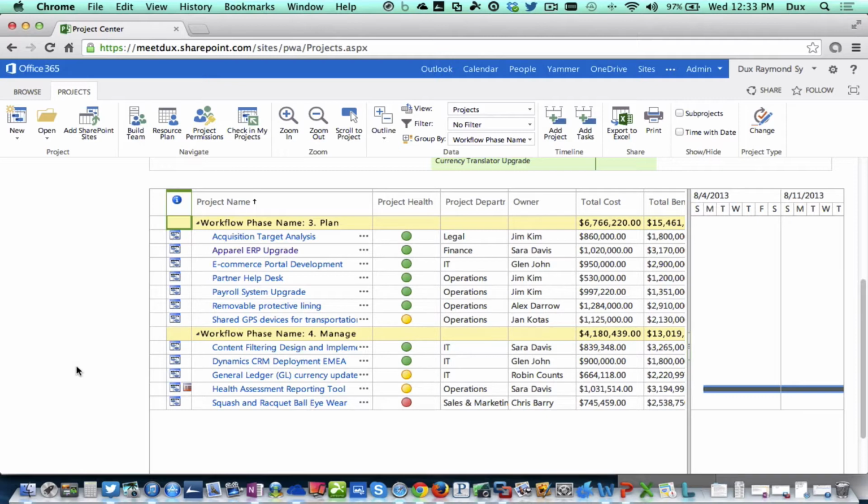And I put a KPI column called Project Health. Now, what do these mean? It depends on your organization. Green may be: as long as it's on budget, on schedule, we're green, right? If it's 10% or let's say 30% behind, then that's a yellow. So you can put all these definitions in there. Total cost, what's been spent, all that good stuff.